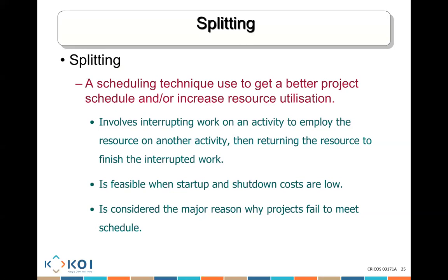What's happening is you're splitting the work. If you're splitting the work, is the job going to take you longer, yes or no? If you split your work, is your work going to take longer? Yes, it is. The reason is that every time you stop the work, to restart it and refocus, it will take you time.